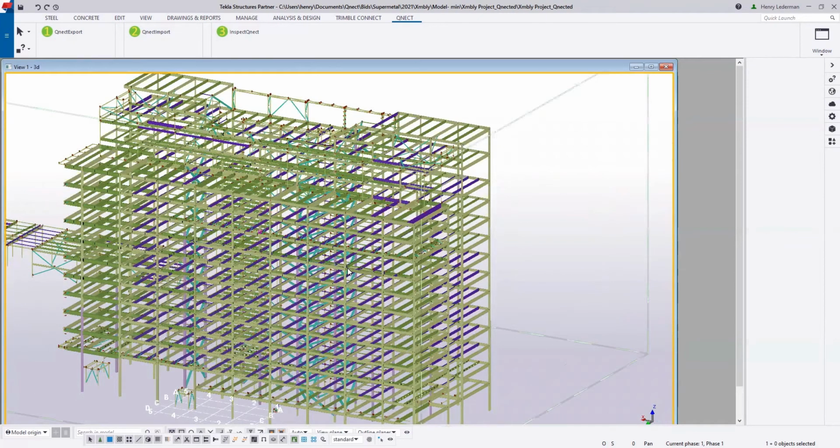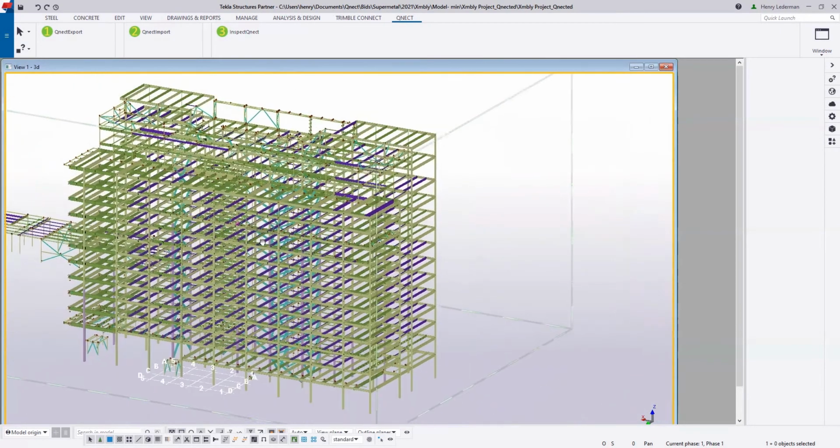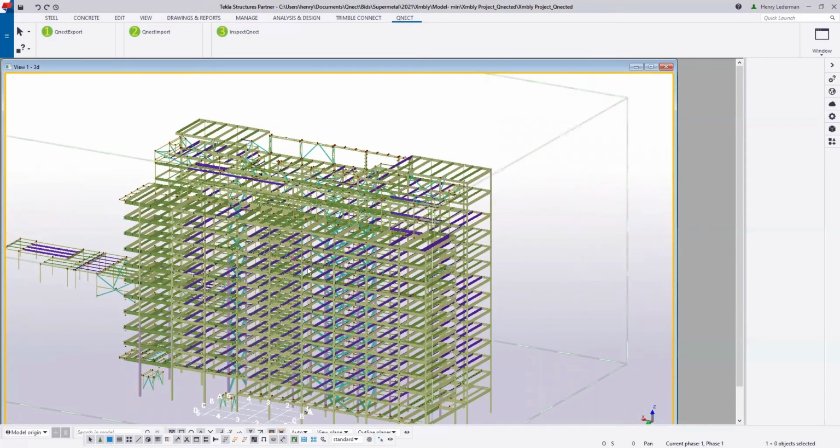We also know, for example, how many doubler plates are required if the beam has been coped and is inadequate for the load. So really, this is the point you want to get to in your Estimodeling process to then be able to take this data and transfer it into the EPM software.